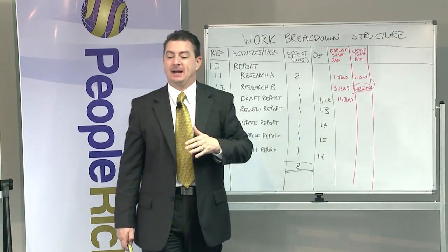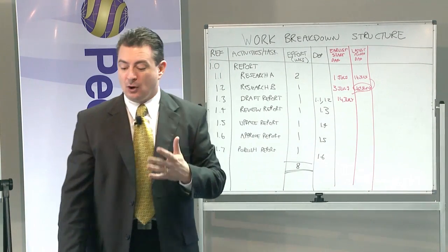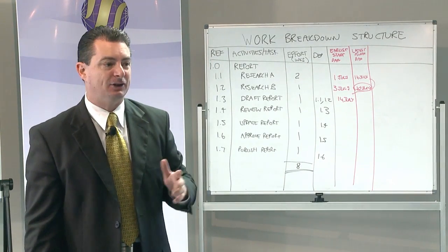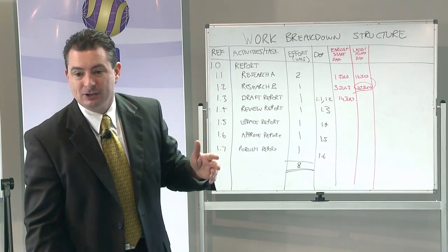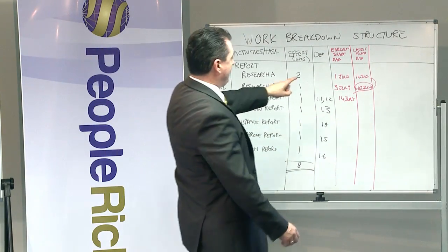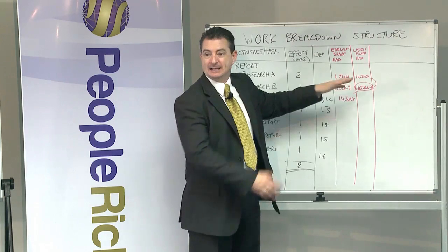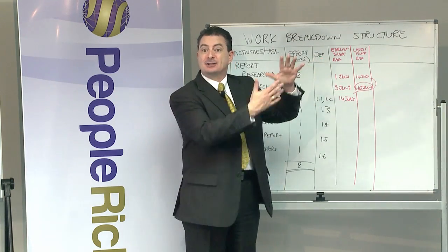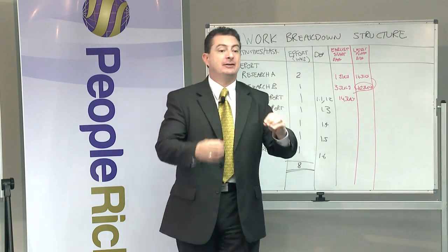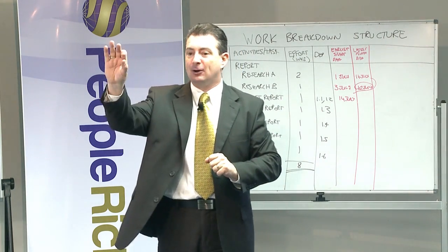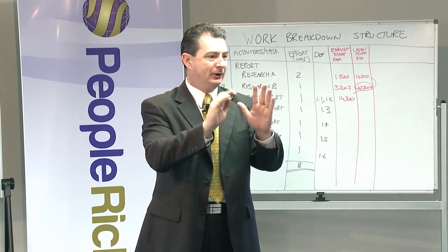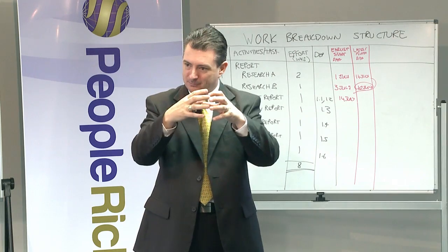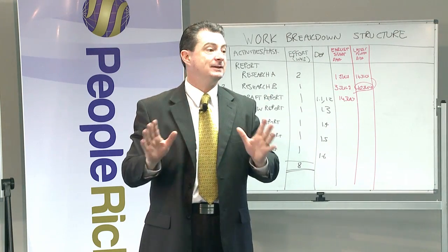Now the beautiful thing about this is sometimes you're told that the project's not going to start then, it's actually going to start in 3 months' time. So what you'd effectively then do is go and change this date, and guess what happens with the rest of it? Updates automatically. You can even go into the computer and say these are public holidays, or these are the dates I don't work, and it automatically then moves the schedule with all those in consideration.